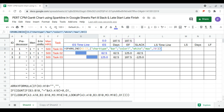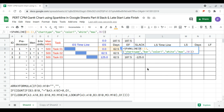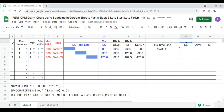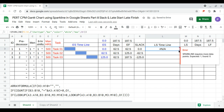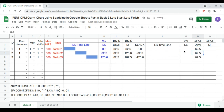For the late start timeline sparkline, we copy and paste the existing sparkline, replacing column H with M and N, and replacing J with column O, then press Enter. We equate the values and drag downwards. The days base will be equal to the RA formula of the durations, and the late start is equal to the late finish minus the duration.